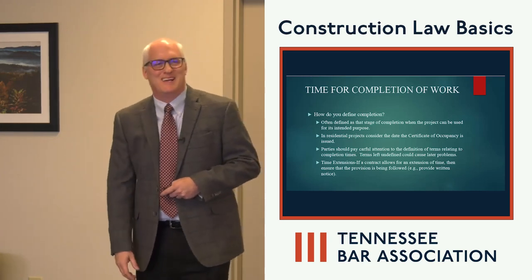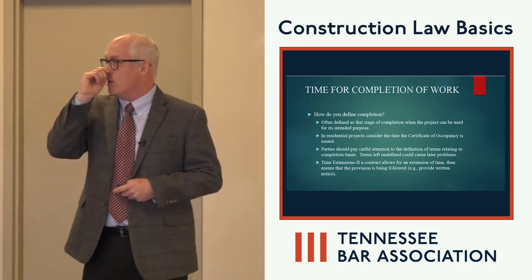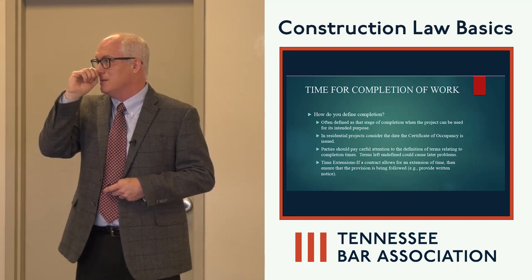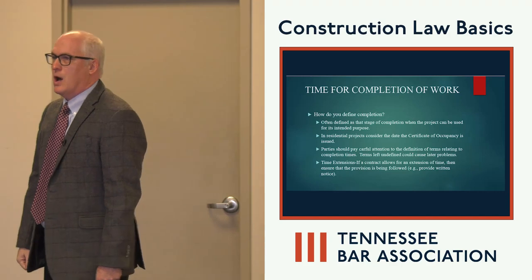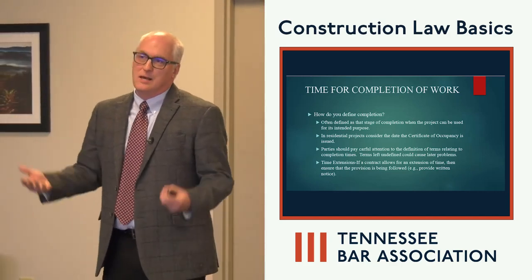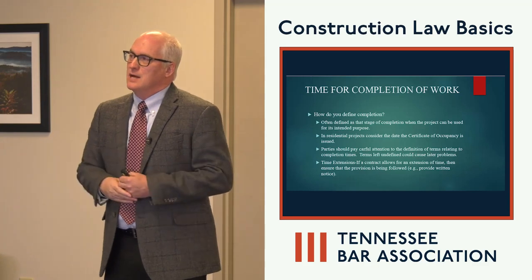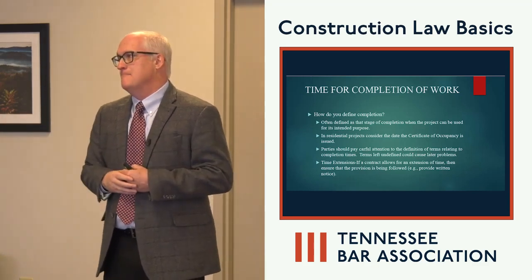Another fertile ground for litigation. Obviously, it's probably completed when it can be used for its intended purpose. In the residential sense, that could be the CO, the certificate of occupancy. Maybe not in construction, or excuse me, commercial projects.